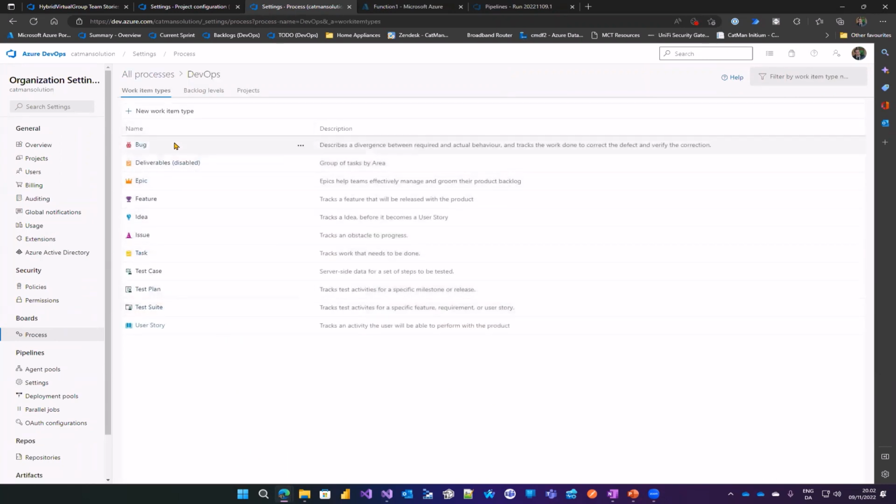And it comes down to how do you want to treat bugs? What's your hierarchy of work items? Currently, we use epic, feature, user story, and bug, and task. We don't use any of the other stuff. And maybe that's even too much for small projects. Currently we have about 300 combined user stories and bugs in the system that we're kind of tracking. And for that amount of work items, we need features and epics to actually control when do we want to release what and so on.